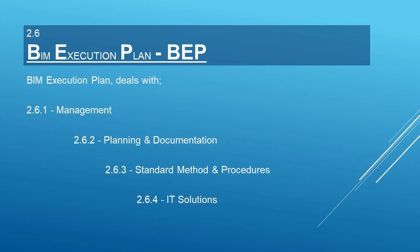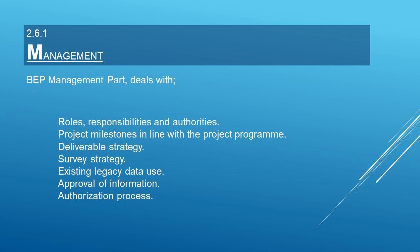The BIM Execution Plan covers management, planning and documentation, standard methods and procedures, and IT solutions. Within the BIM Execution Plan, the management part deals with roles, responsibilities, and authorities, as well as project milestones in line with the project program.